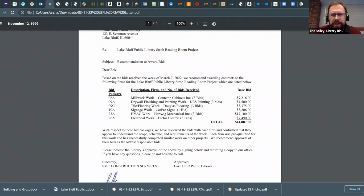Okay. And the HVAC work is really focused on a lot of rebalancing for an enclosed space? Well, the HVAC work, primarily the meat and potatoes of this is the fireplace, running the gas line. And then there's a little bit of auxiliary work with moving the heater over and enlarging that diffuser. We did track the testing and balancing as kind of an outside line item because the problem is if I put it in as bid, I never get the full amount back. So I'd rather have an allowance, and then if we need it, we'll spend money out of the allowance.